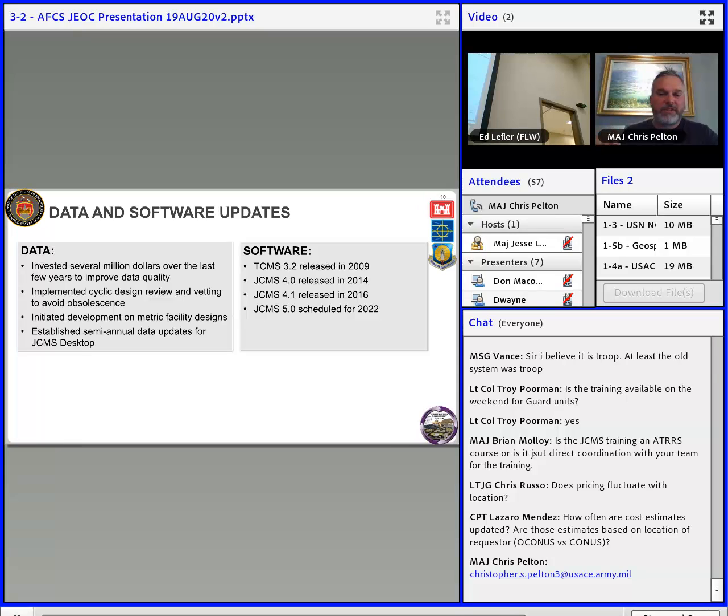If you say, I don't want all of the items on here, or I'm going to swap them out because you can get a quicker item locally where you are, then obviously you'd have to take that out of the pricing in your Microsoft Project and put in the new pricing that you're going to procure it for over there. So you have the ability to not order everything. You can order locally if you choose to do that.